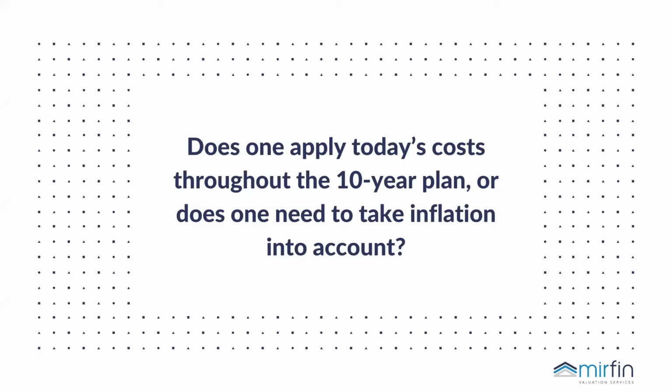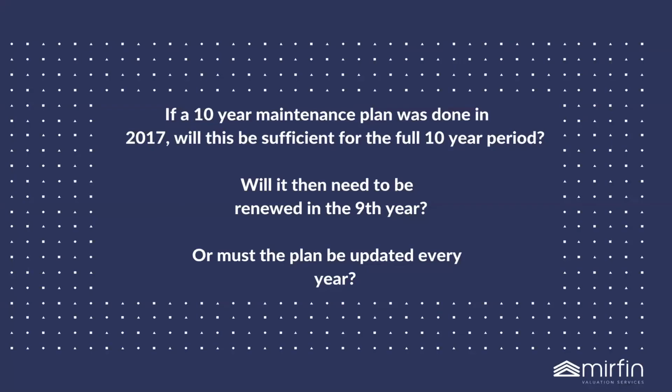And I've touched on this again. The answer is no. You can't assume that the 10,000 Rand that you're planning for today is going to be the same in 5 years' time. So you do need to apply an escalation. I can't really say that inflation is necessarily the right escalation. There are certain expenses or costs that escalate differently to inflation. They might be more or less. But I think the short answer is that you do need to apply an escalation over the period of the 10-year plan. You can't just use the same figure and assume that the cost today will be the same as tomorrow.